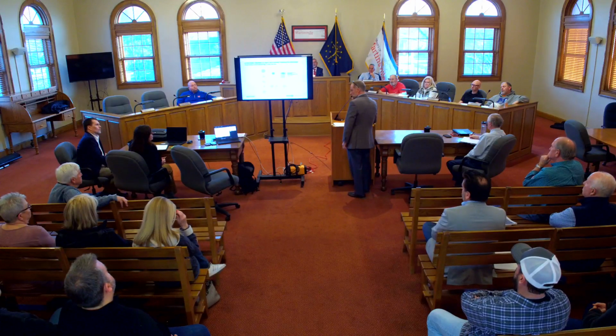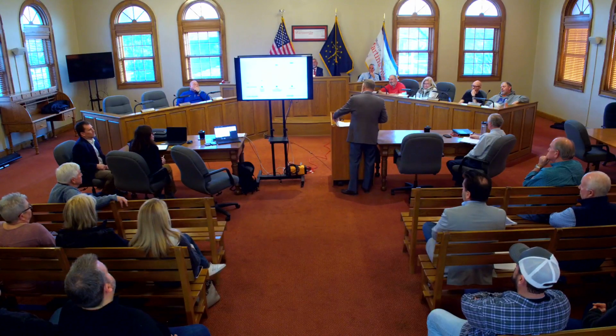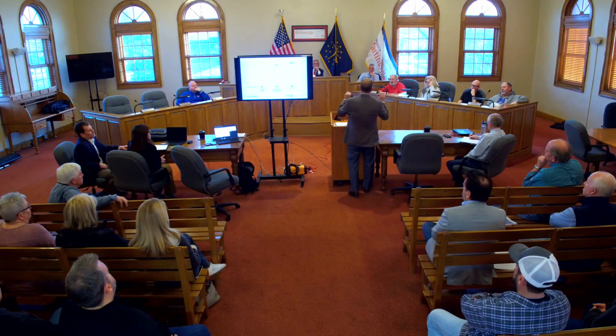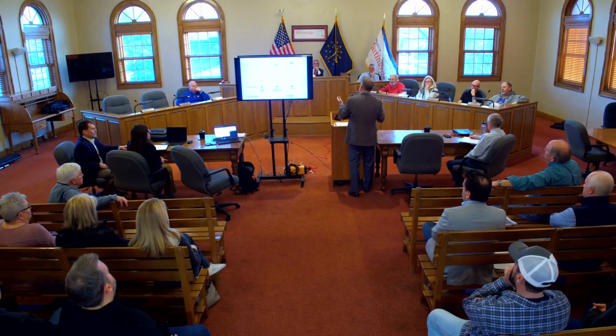I lost my mouse. There it is. Another thing that we've been working on in this project, one of the challenges about working within a building of this vintage, is once you start pulling on the sweater, it starts to get to be very, very expensive very, very quickly. And you can wind up in a situation where you have committed and you just can't stop. So something like, we'll call it paint up, fix up, right? To change the finishes out in this space and the other spaces that are in this building, that is not a particularly big deal. It's money. I don't mean to diminish the value of the money, but it can be done without incurring a lot of additional